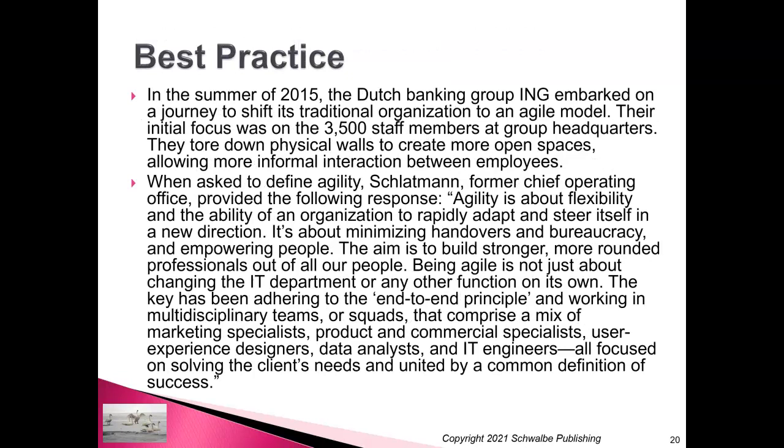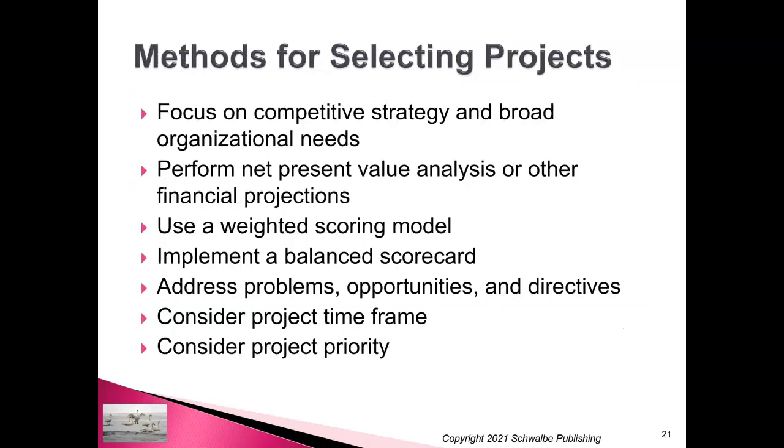Here's some more best practices for you if you want to pause and review it, worthwhile for you to do. There are lots of ways to select a project, but you want to always make sure that your project is going to deliver at the C-suite a company's competitive advantage, which requires then a competitive strategy, right? There are ways to assess the business analysis, as we saw on the triangle a few slides ago. And one way would be to assess net present value. Or you could also assess return on investment. You could assess payback period. You could use a weighted scoring model because maybe it's dollars made, but it's also reputation and it's quality, whatever is important to you. And you could weight those in your decision to select a project.